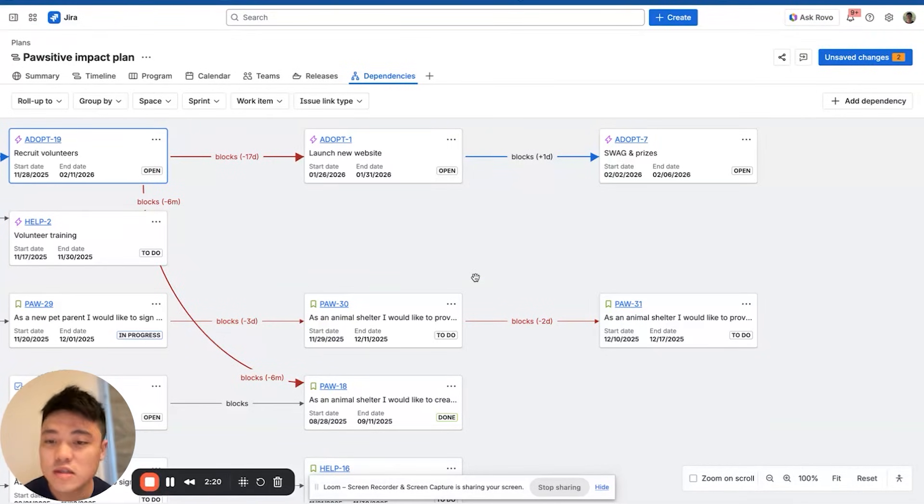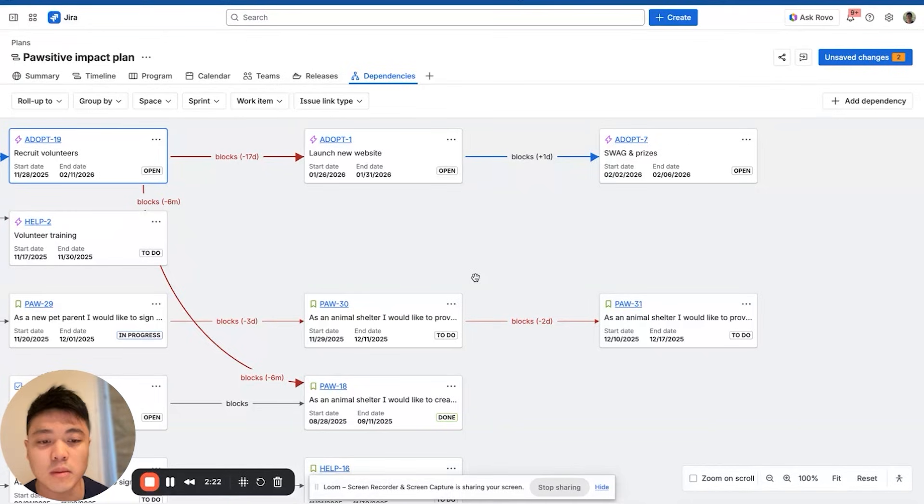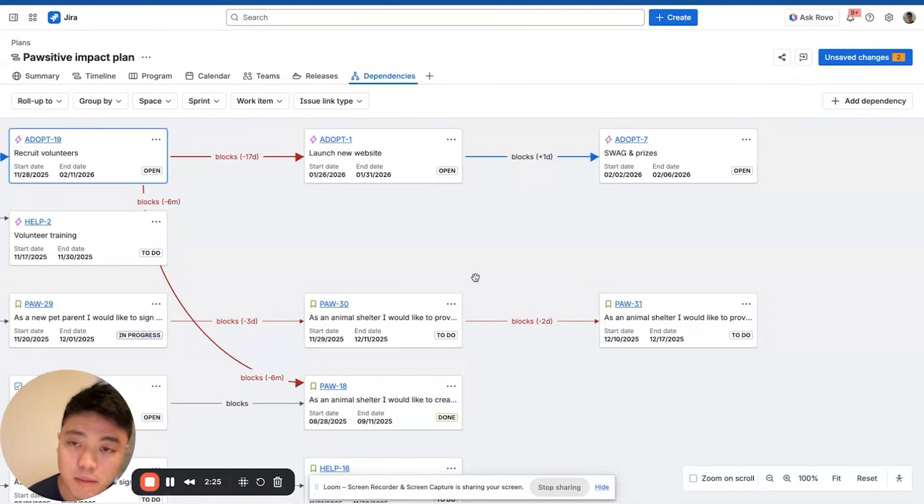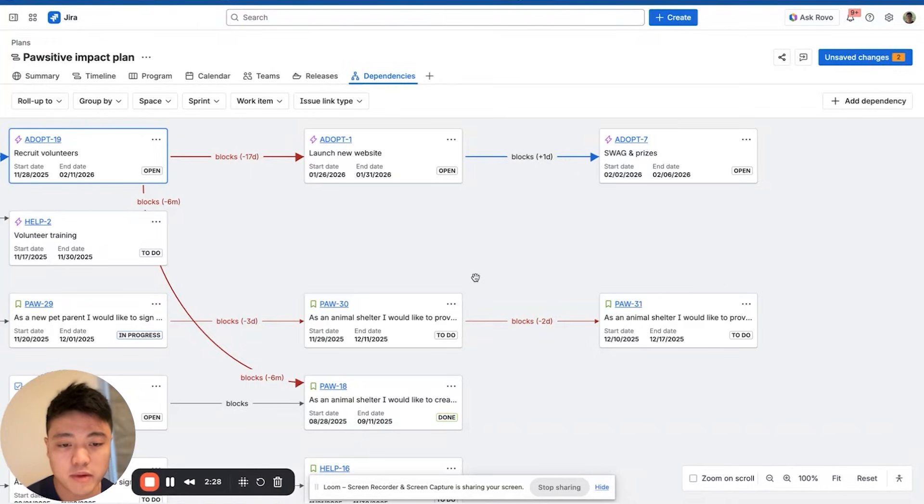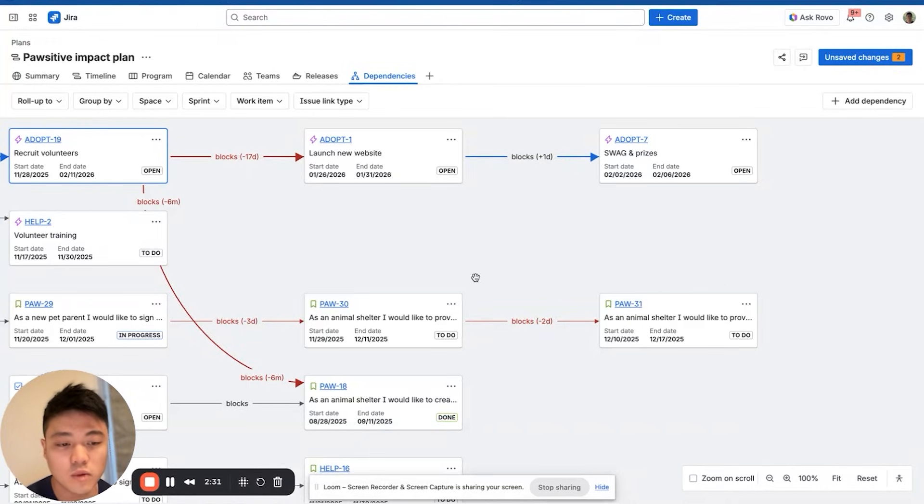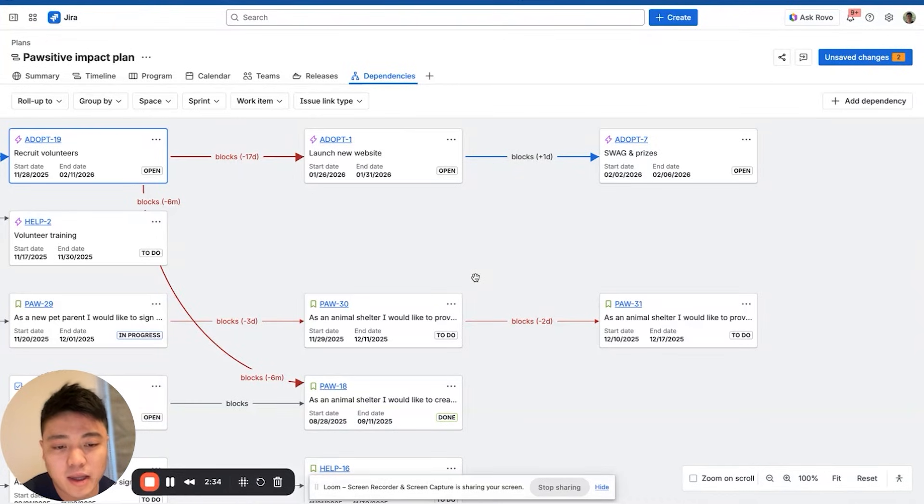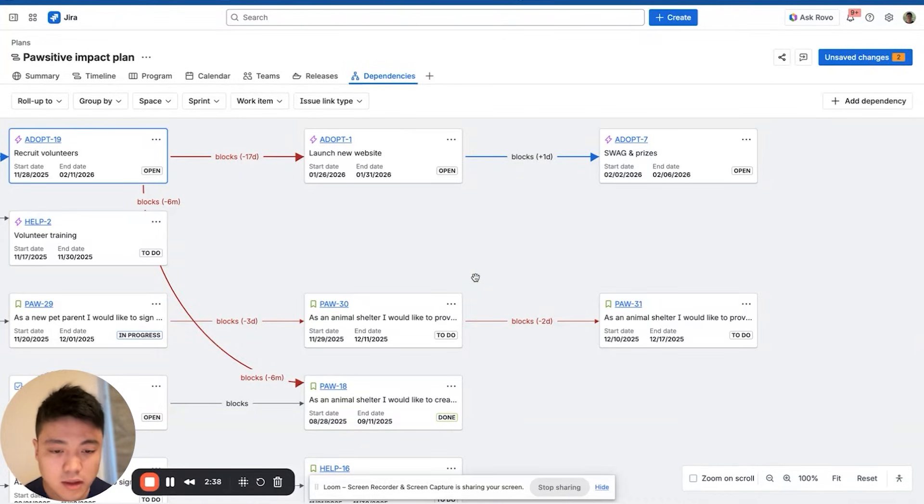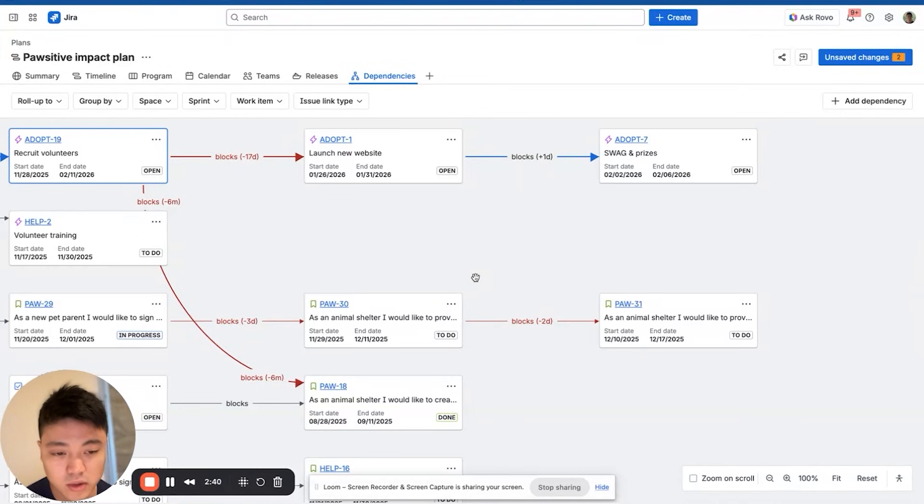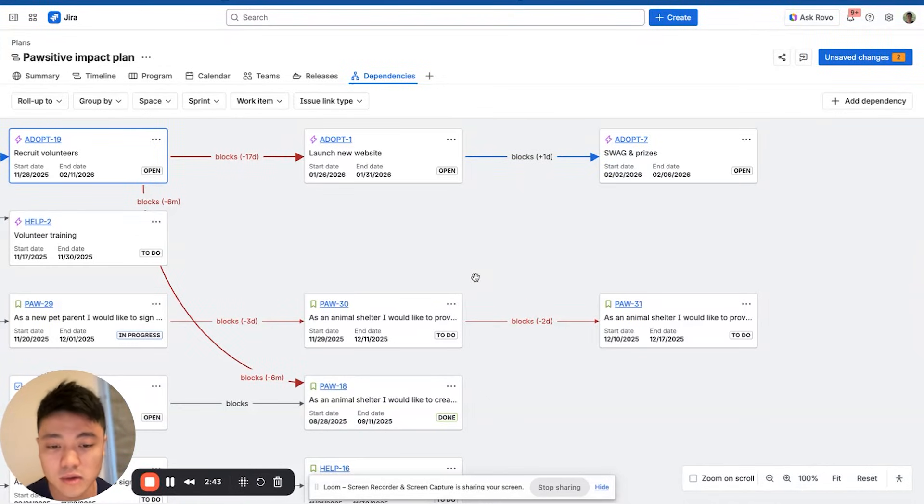This is really powerful because imagine your marketing team is preparing for a major product launch. Several tasks need to happen in a specific order and some depend on work from other teams. For example, the marketing campaign can't go live until the new product landing page is built by the web team. The landing page can't be published until the design team delivers final graphics.